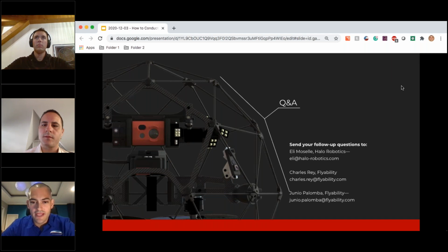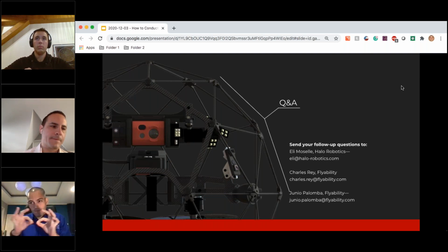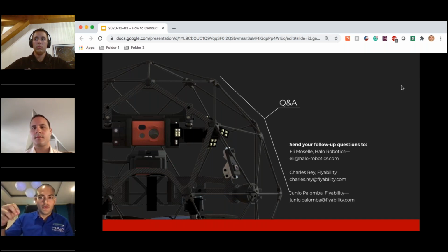One thing that can be done, and we consider in some operations, is using fishing line, which is very, very thin and flexible. If the drone is for some reason not able to get out or gets stuck, the line is attached and goes with the drone the entire time that it is flying, and it can be used to pull it off of an obstacle, or if it's been impaled by something.